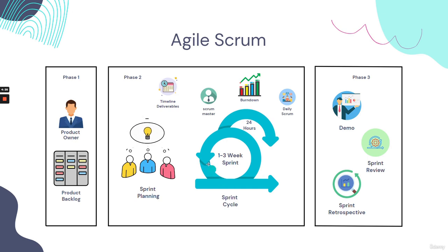During these sprints, we go through the daily process within a 24-hour period of every day within a sprint includes a daily Scrum meeting in which we all get together as a team between dev team, QA team, project managers, and discuss a very important breakdown consisting of 3 questions.